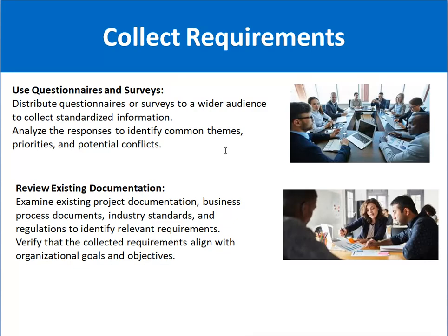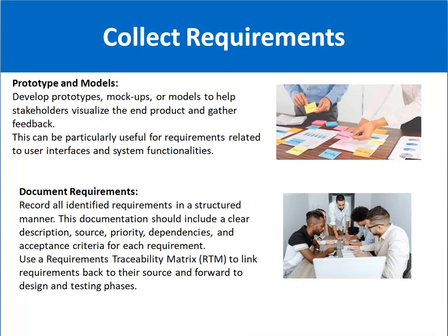Reviewing the existing documentation is also very important. For example, existing documentation like business process documents, industry standards, scope documents, issue logs, lessons learned, and regulatory requirements, to identify relevant requirements. Verify that the collected requirements align with the organizational goals and objectives. These are very important.